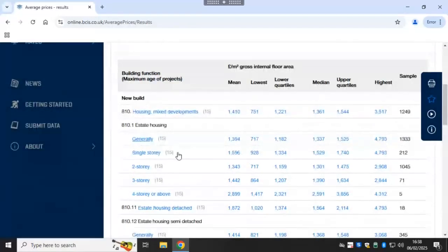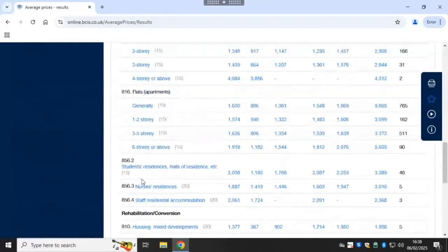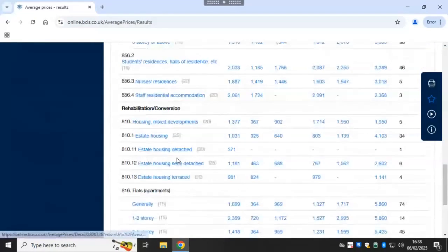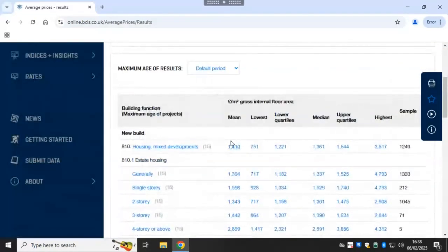And this code is telling us the classification with regards to building use. So let's make use of this. The rate cost per meter square definitely is this 1410. I might not bother about all the others, even though in further, more advanced analysis, I might make an argument for median ahead of mean.